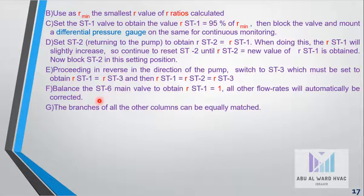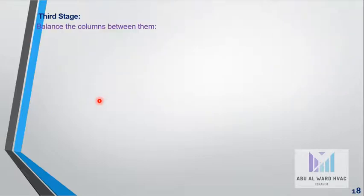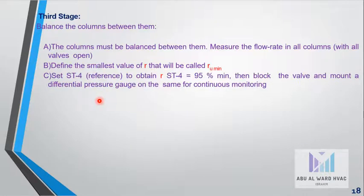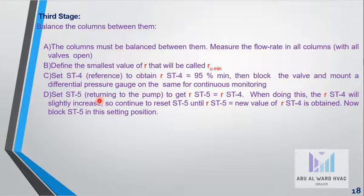In the third stage, we are going to balance the columns between them. Measure the flow rate in all columns with all the valves open. Define the smallest value of R, called R_u minimum. Set ST4 reference to obtain R_ST4 = 95% of R minimum and block the valve and mount the differential pressure gauge on the same for continuous monitoring. Set ST5, returning to the pump, to get R_ST5 = R_ST4. When doing this, R_ST4 will slightly increase, so continue to reset ST5 until R_ST5 new value equals the new value of R_ST4 obtained.